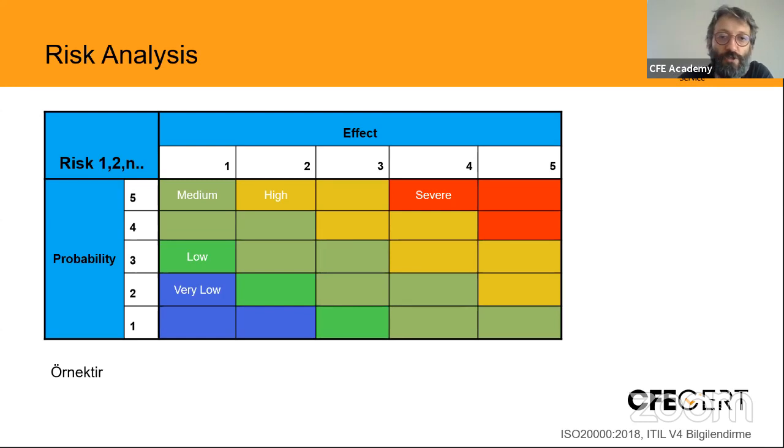In the process which has to be written down for Article 6, you need to define what these numbers mean. It doesn't have to be 5 times 5. You can use 3 times 3. You can use 4 times 6. It does not have to be square based. But in the process, you have to write it down.